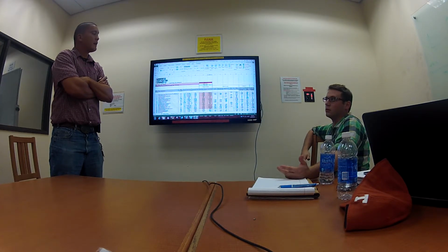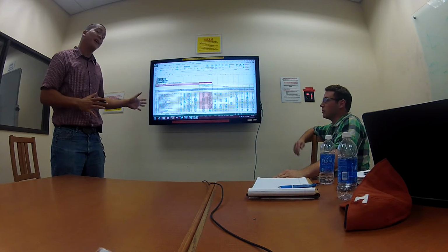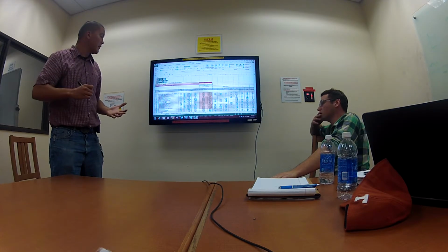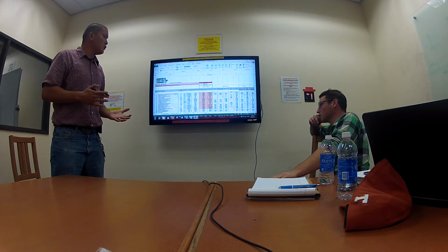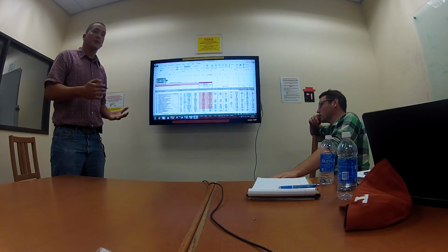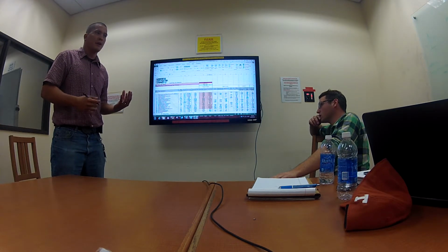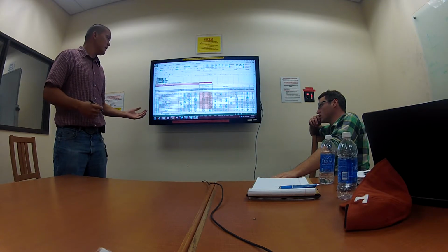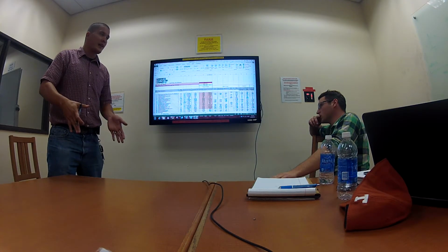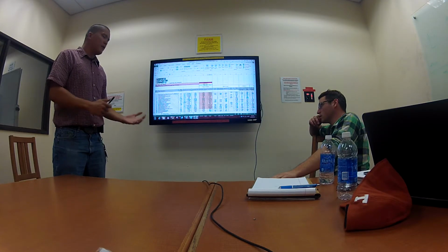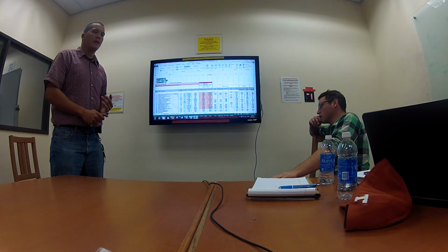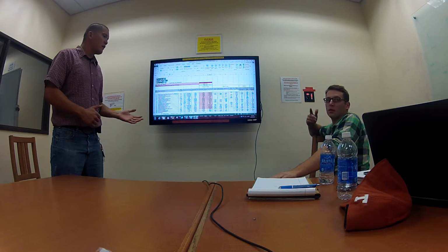It kind of depends on how many bid items they give you and how much time you think you're going to have. At some point you're going to have to close out more and just keep a handful of them open coming up to the last minute. You've got to pick what that time is going to be, a half hour before or something like that. But generally the ones you close are smaller sub items that they didn't give you.